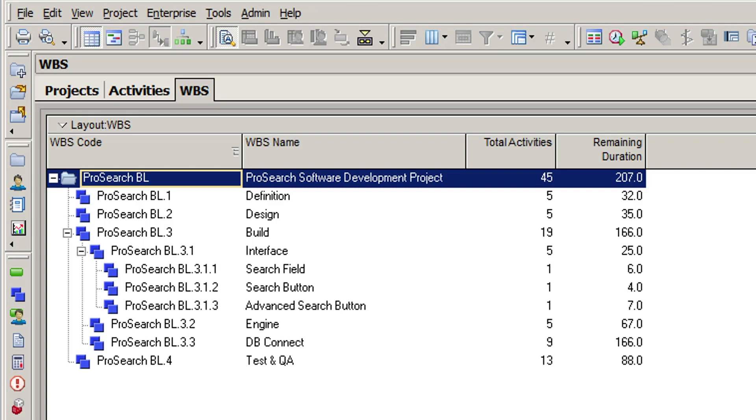With just one activity each, compared to a minimum of five in the other elements, these WBS elements are unnecessary and add little value to the structure.